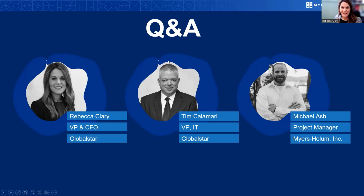Yeah, I'll go. Recommendations? Do a lot of research. We had a third party with institutional knowledge come in and go across the board, whether it's security or auditing or whatever, and they knew what we were looking for. They spent a few months interviewing our folks and some other firms. A lot of work up front. Allow enough time, and however long you think it's going to take, add another 3 to 6 months.